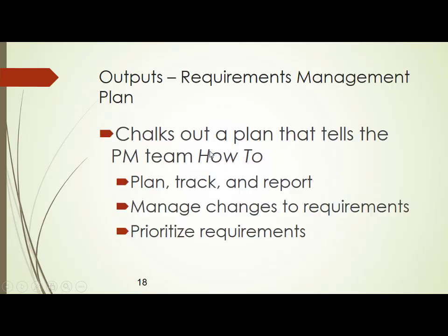What is the requirements management plan? It will tell you how to plan. It chalks out a plan that tells how the project management team has to plan, track and report, manage changes to requirements and prioritize the requirements. So now you have so many requirements, and you have to plan them properly. Which requirement should come first? Which requirement should come next? You have to plan it, and you have to prioritize requirements.